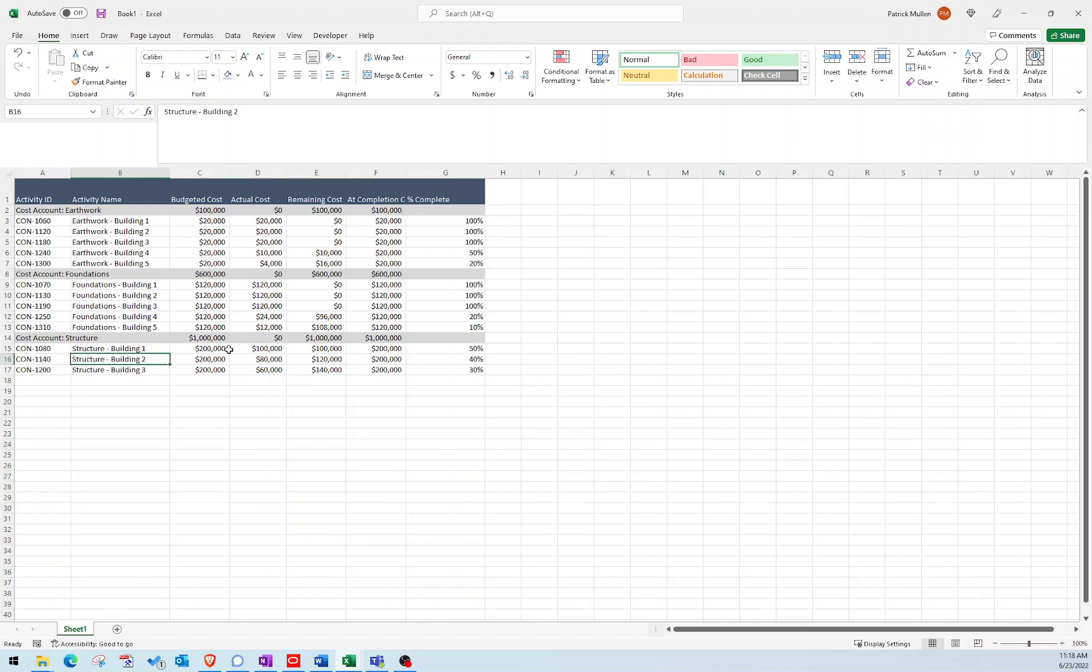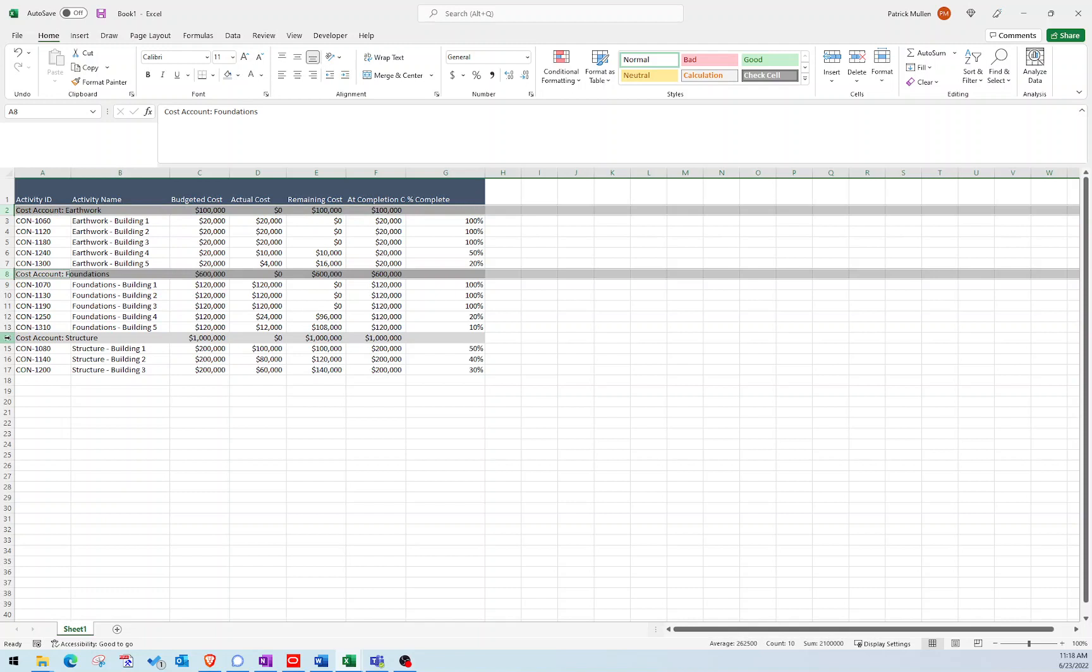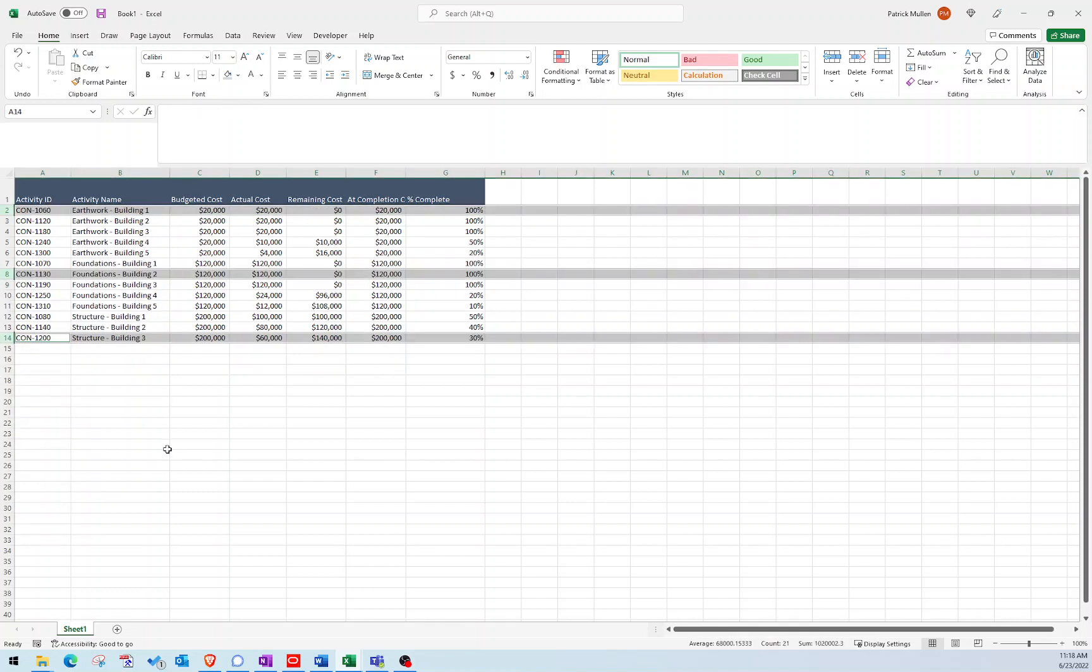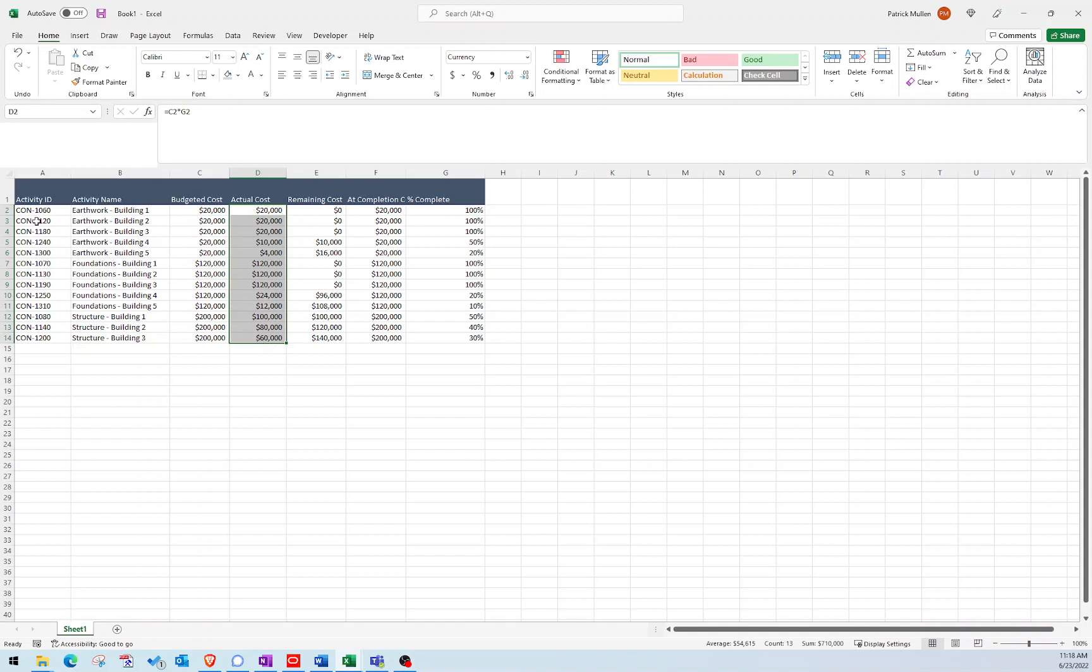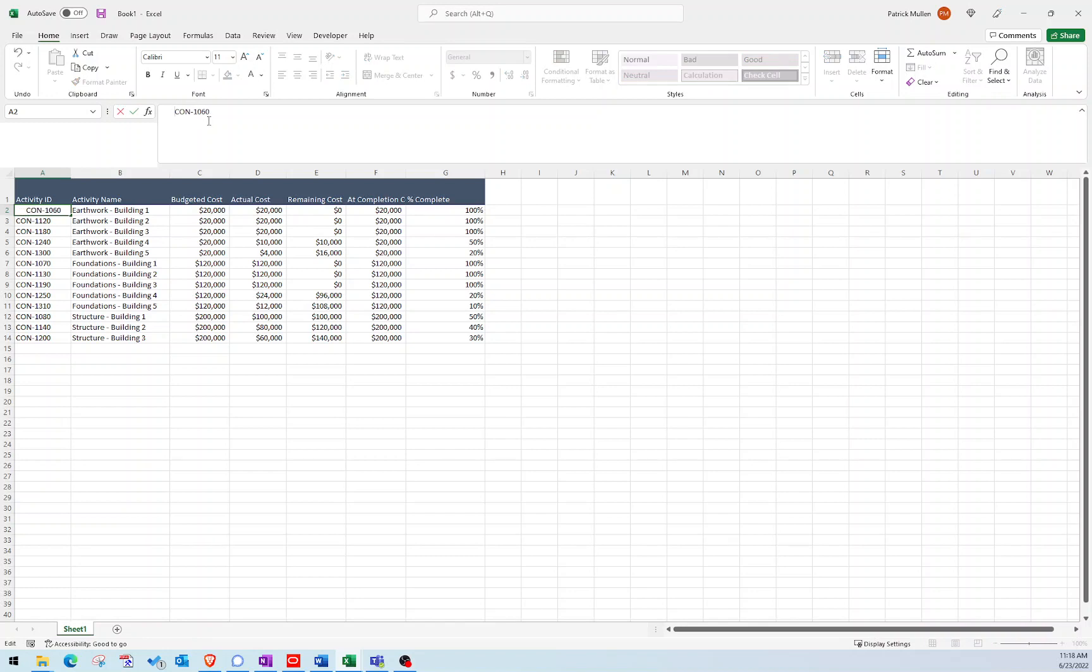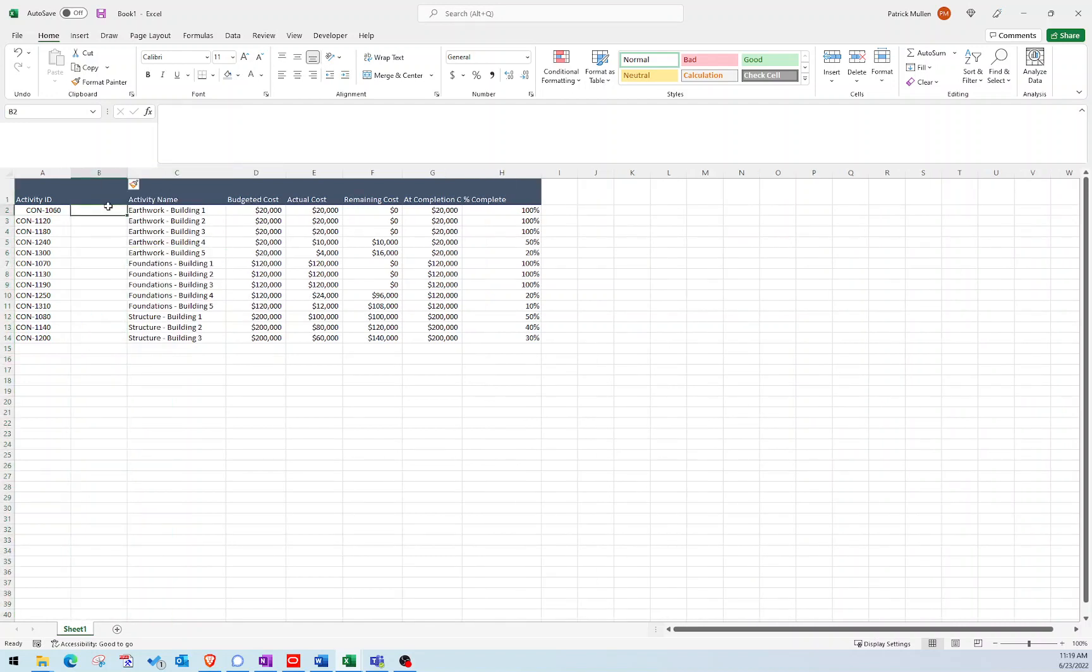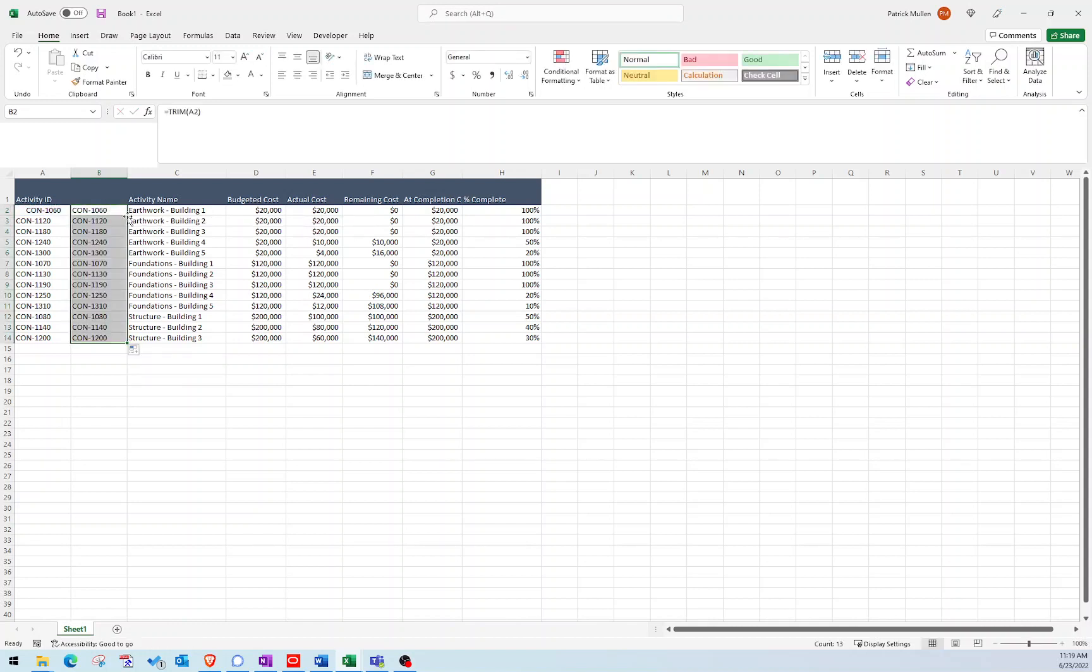And then I have these headings here, which I also don't want to import those. So let's go ahead and delete those. And so now I'm just left with these activity IDs and then these values here. One thing I show in other videos is make sure that there's no leading spaces in here. Sometimes you'll see in a pay application it might be indented or something like that. So what I always like to do to just make sure that I have a clean activity ID is I'll use the formula called Trim. And I'll trim that cell and it removes the leading spaces in there.